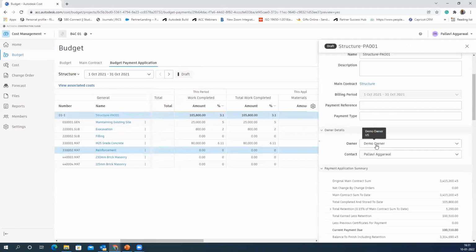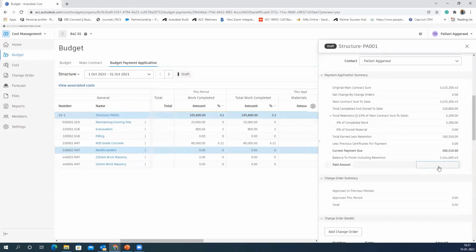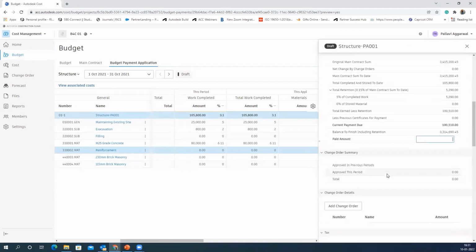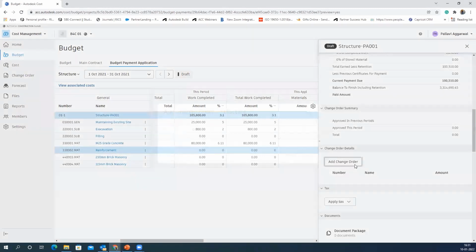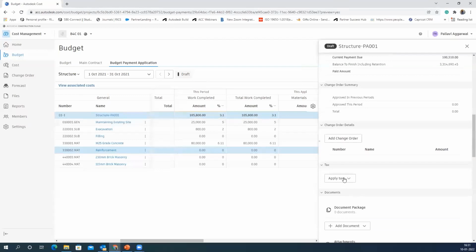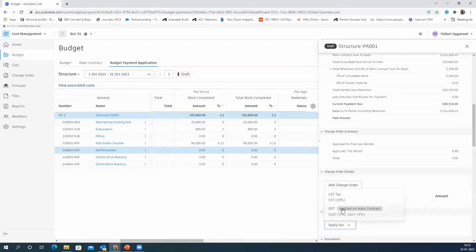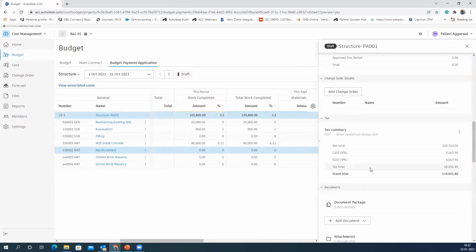If we want to give a budget type to which person, we can now add the taxes that we talked about in the initial stages. We are adding those taxes here, and then the total cost is given to us. Once the bill is paid, you can also mention the bill amount which is paid. You can select who is the change order. If there are any change orders, you can add those change orders in the bill, and then the values will be added up. Over here, we are trying to add a tax formula that we created, and then the value will be changed like this.